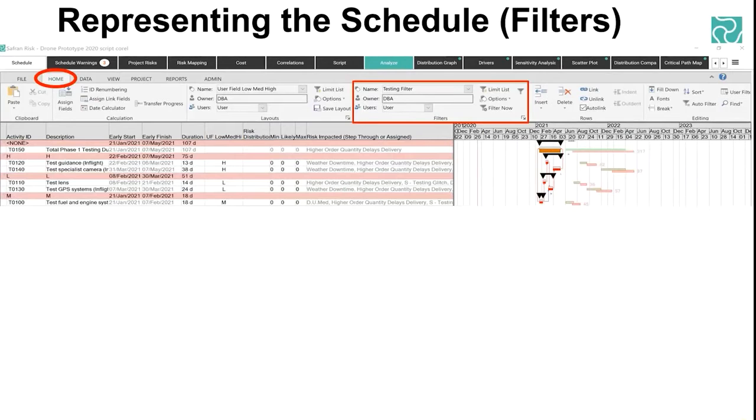So that means, just getting ahead of myself, in conjunction with other things like the filters, which are now being shown, that you can actually show whatever is pertinent for an upcoming risk workshop. So again, going back to my example where you might have several tens of thousands of activities, if you want to shrink down the scope of what you're about to talk about for the next hour with your team, because you've only got 1 hour of their precious time, you start playing with the filters like this. I just want to show it in this way, organized by WBS or low, mediums, highs, whatever. And I only want to show the testing phase of the project like I've done here through clicking that button.